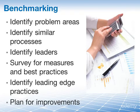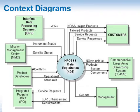A context diagram illustrates the project scope by modeling business processes and systems and how people interact with them. In software engineering, these diagrams represent a system at the highest level and the various actors outside the system that interact with it. Context diagrams identify the people you need to consult and business processes to consider when collecting requirements, and are used early in a project to obtain agreement on scope.